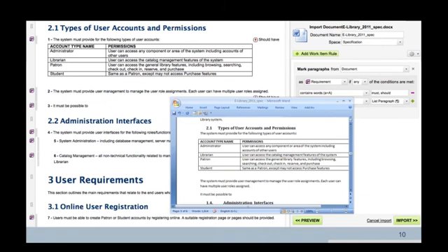And what's so wrong about managing the requirements just as a Word document? The number one reason we think is essential when tracking requirements is the granularity. So there is, and I'll show it later, an essential goal, not just to import a document as is, but make sure that every piece of information in the document, the initial specification, is uniquely identifiable and traceable. So that's the first point: take the unstructured data and import it into the system and make it structured, but in a way that you can still more or less access all the data, so you don't lose any information on the import.